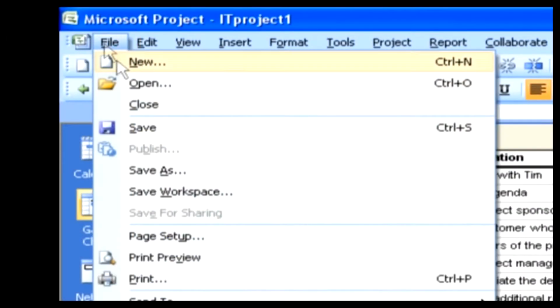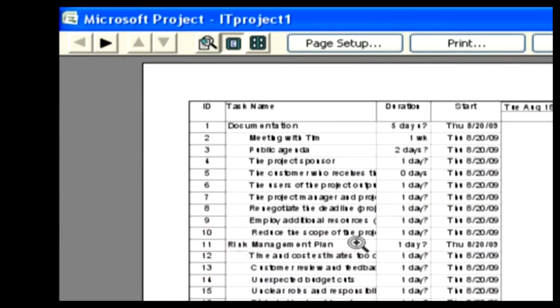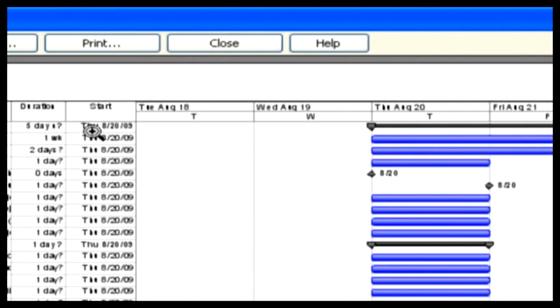Let's again go to Print and then select Print Preview. Now we can only see 3 columns. This is because Project 2007 prints fields that are fully visible. We cannot view the 4th field or column here. That's why you must be very careful while taking a printout in Project 2007. It helps in avoiding some confusion.